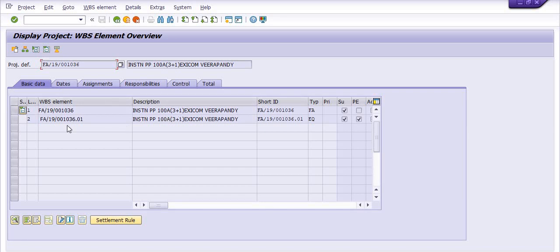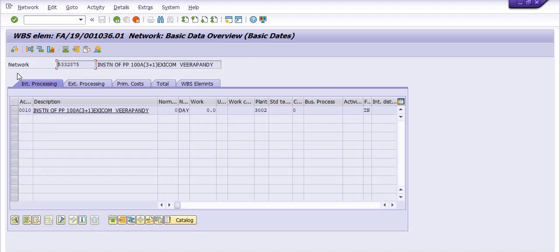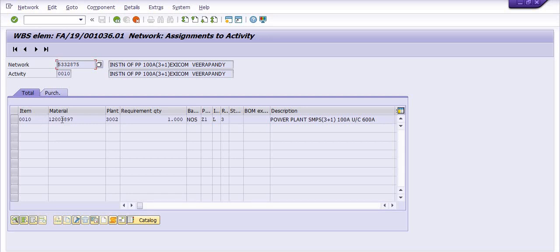If you want to know what activities are planned in the WBS, select the WBS line, go to Dates, then Activity Overview. There are three options: internal processing, external processing, and prime cost. Generally in internal processing, material planning is done — for example, what materials are planned and what the material requirements are in this project.